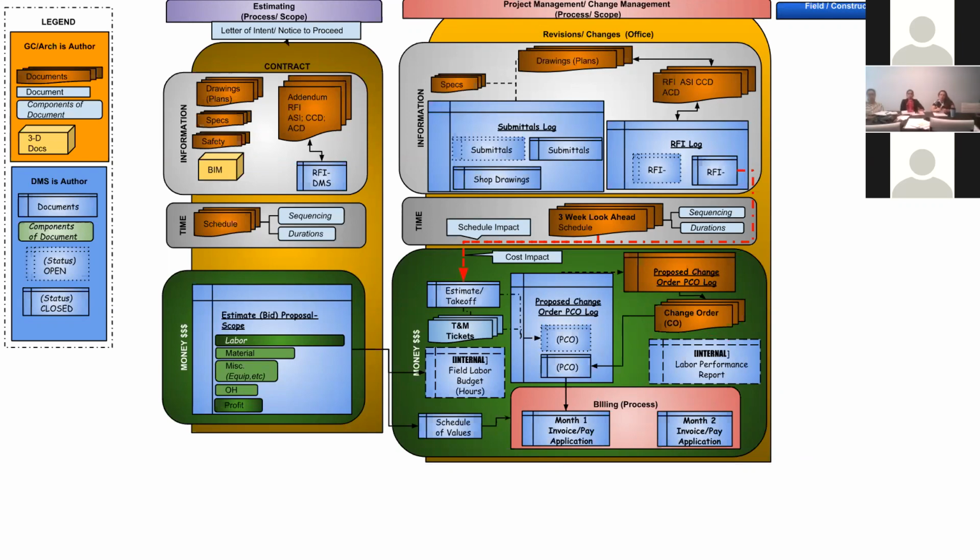Doing this in the month when billing is due is a tremendous task for Brooke and Chelsea and the accounting team to go, wait, you have this billing. Now you want me to revise the billing? You want me to include this change order? Have they agreed on the number? Okay, and once you agree on the number, did you agree on the percentage? Oh, you didn't agree. Okay, we agreed there's a $10,000 change, but you guys say you're 75% done. The GC might say you're only 60. So then there's a whole other synchronizing to get clear on that. So that process can take days and even weeks to get finalized.